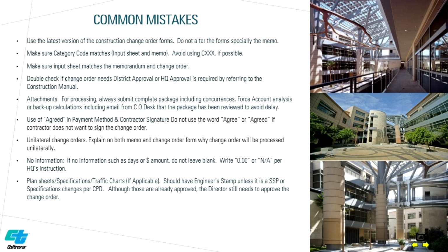Use of agreed in payment method. Do not use the word agree or agreed if contractor does not want to sign the change order. If contractor refuses to sign, that means there is no agreement. If contractor refuses to sign the change order, indicate in memo and change order and explain why contractor refuses to sign, and change order will be processed unilaterally.